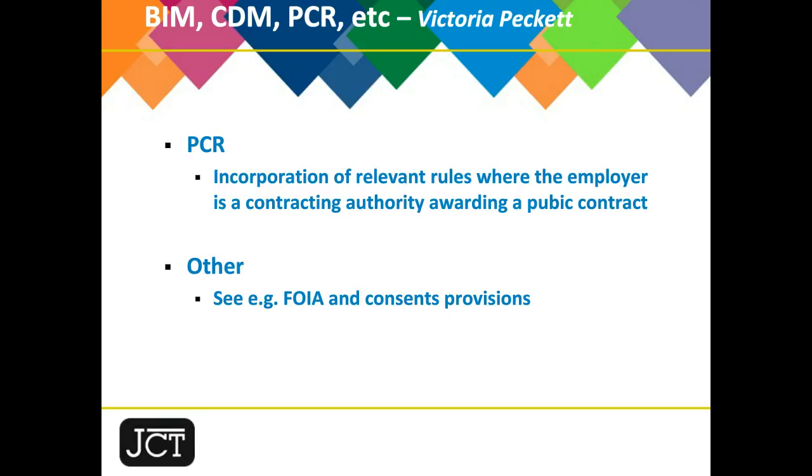One of those is in relation to payment, and particularly payment periods. The regulations now provide what had previously been guidance and good practice, which is that valid and undisputed invoices ought to be paid within a 30-day period. Now, that's absolutely fine if you use an unamended suite of JCT contracts, because that's what happens, and we'll come back to that later on. But it's also a requirement of the regulations to include obligations to make sure that those obligations are flowed down through the supply chain. So we've included amendments to make sure that happens.